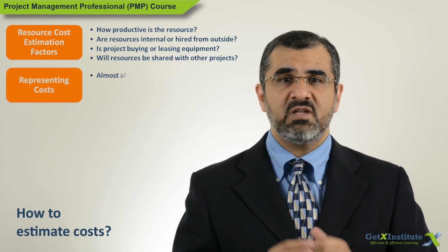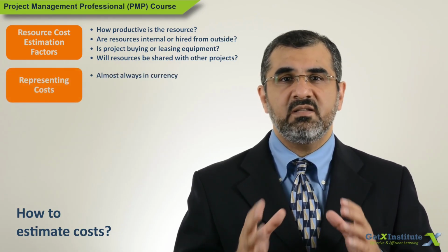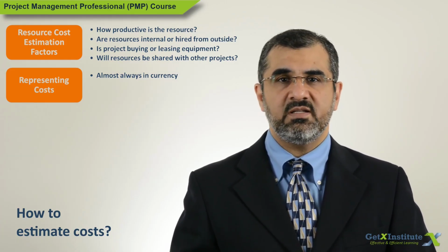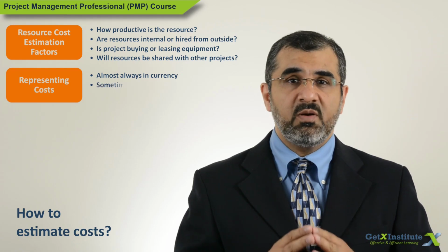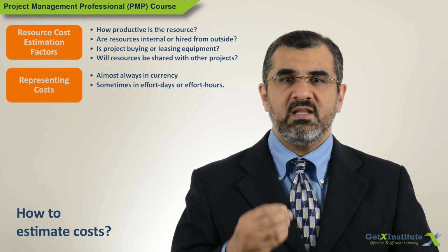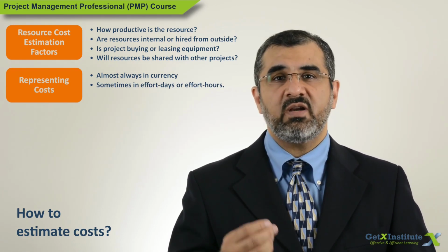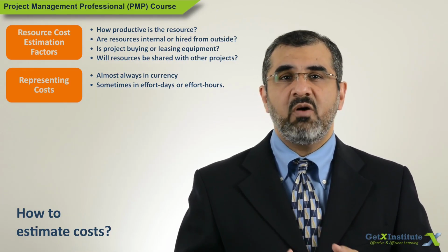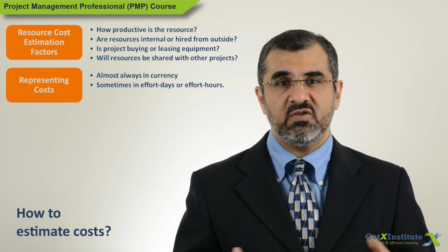Cost is almost always expressed in currency terms, for example, dollars or euros or other currencies. But some global projects instead represent the amount of work in effort days or effort hours. This removes the uncertainty about changing costs due to currency fluctuations.